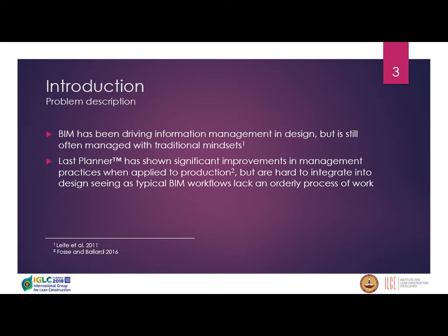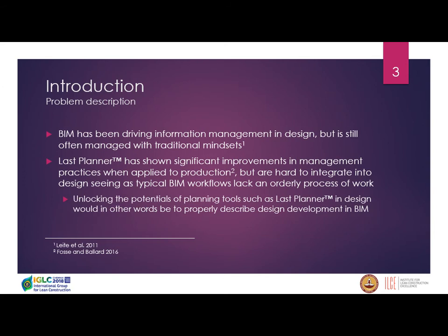So the easy suggestion for us as researchers to make to managers who want to plan and control their design process in an orderly fashion is to use planning tools such as Last Planner, which has shown significant improvement in management practices when applied in construction phases, but has been found hard to integrate into design because typical BIM workflows lack an orderly process of work. In other words, unlocking the potential of using planning tools such as Last Planner in design would mean finding a sound approach to describe the iterative and reciprocal nature of design.